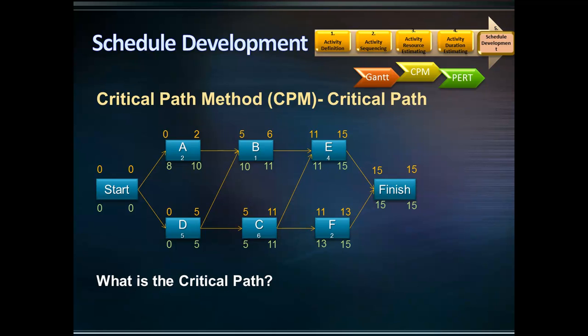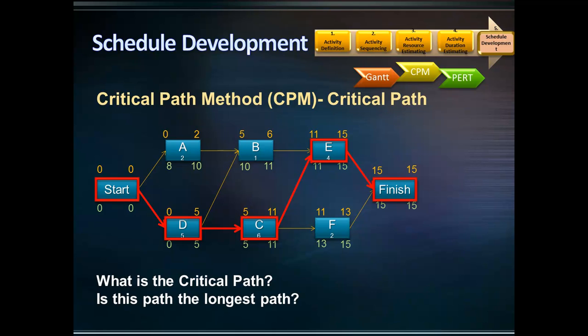What is the critical path in our example? To answer this, you need to calculate the total float for each activity. The activities with zero total float are on the critical path. Activities D, C, and E have zero total float. Therefore, the critical path is Start → D → C → E → Finish. The length of the critical path is 15 days.